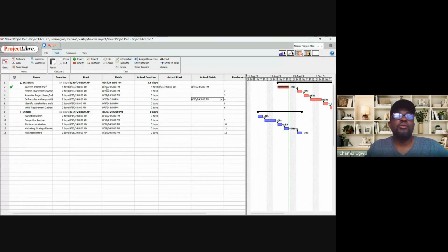Once I finish planning, I'll baseline everything. After baselining, once I'm updating the actuals, you will start seeing the discrepancy from my actual start, actual date and duration.